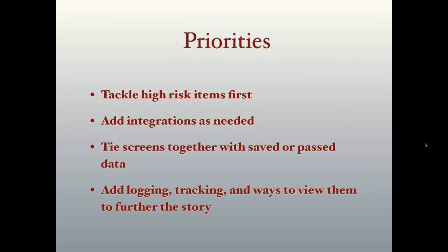Priorities as you're looking at building a clickable demo. The things that you want to discuss, we talked about: you want to go through the use cases, you want to go through the requirements, but you also want to focus as part of your story. You want to make sure you're bringing out the high-risk items first.